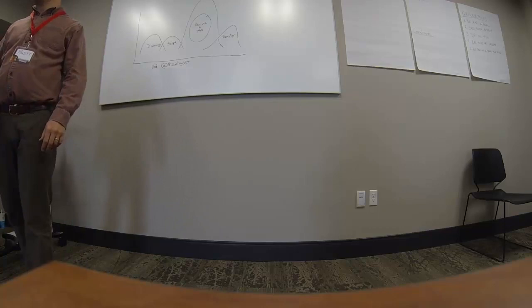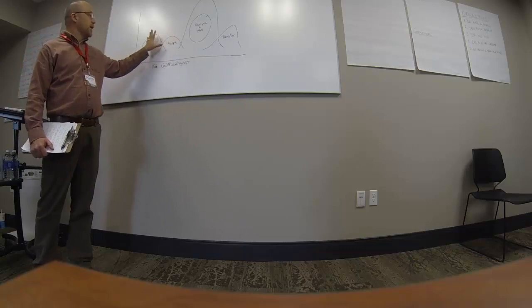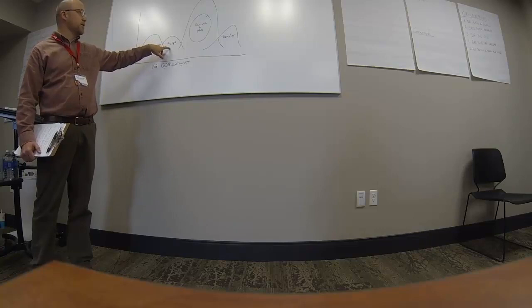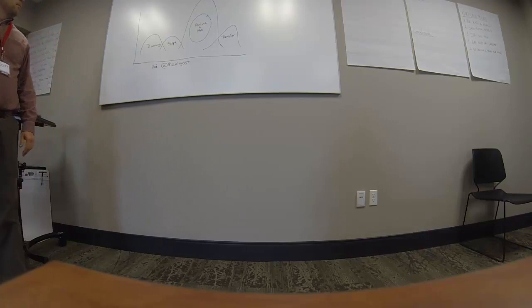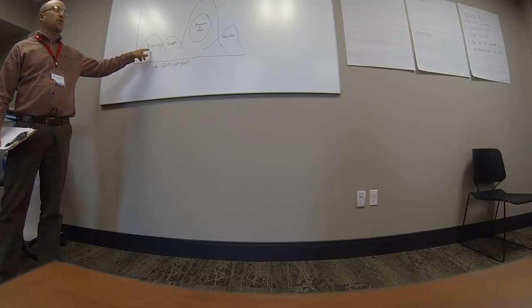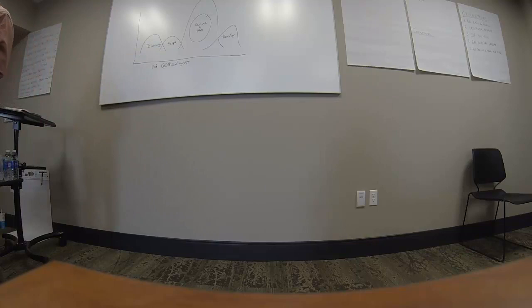It sounds like Micah is actually doing something very similar where he will go out and talk to a customer and he'll charge a price, a fixed price or maybe TNM. But he charges a separate price for this stage of the project. At this point, he says, if you want to continue, this is what your estimate looks like. That's really the hard solo of what we're doing today. We want to look at this project, try and figure out what is it, why do you want it, who wants it, and why do they want it, and then end up with a pretty good estimate.